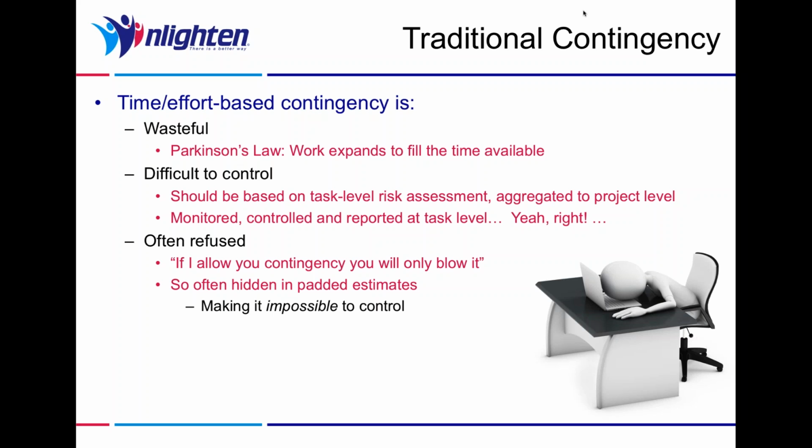Now, that sort of contingency, that traditional time and effort-based contingency, tends to be wasteful. And it's wasteful because of Parkinson's law. Parkinson's law says that work expands to fill the time available.